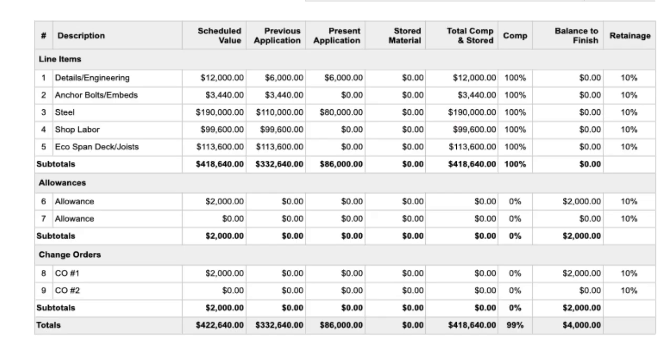So let's get started. When you sign a construction contract, your engineer will prepare a master form of pay application in Excel. They'll then use this master form of pay application to create your individual pay applications. Because this pay application has been created in Excel and pay applications mimic the form of a table, like you can see here, you can actually run a pivot table on that master form of pay application.